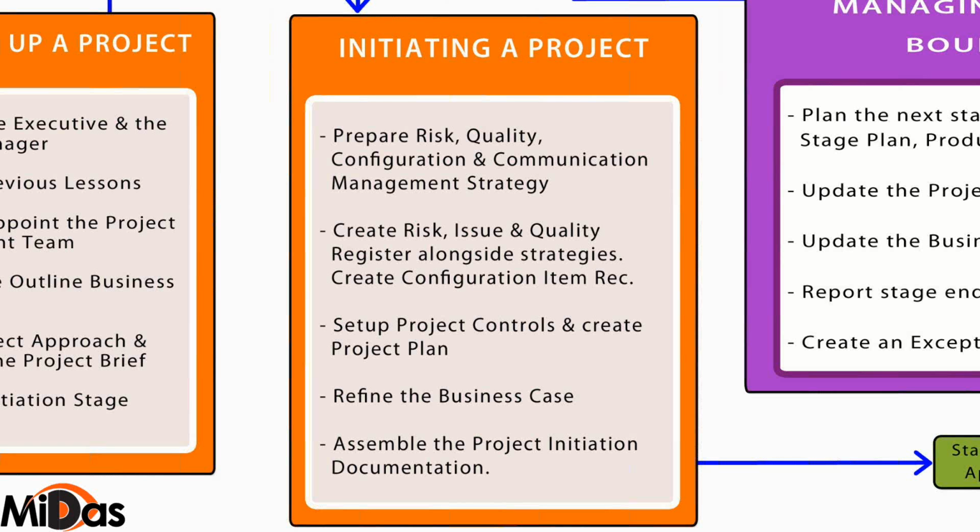You would then create a project plan. Now, the project plan cannot be refined at this stage. It cannot be a definitive plan at this stage. So there will be a lot of assumptions going in. Probably this is the amount of time that would be required, this is the cost that would be required. Most of it is assumption. It is only going to be refined as we go ahead within the project.